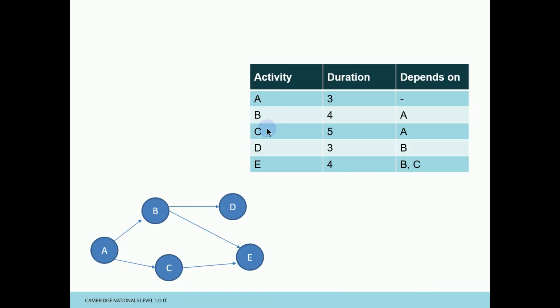So the next thing, this hopefully you recognise as a PERT chart. Okay, so a PERT chart, or Program Evaluation and Review Technique chart, provides a graph of the timeline for a project. It takes the fixed end date for your project and then calculates backwards. So unlike a Gantt chart where you start at the beginning and you work to the end, a PERT chart works in reverse. We find the end date when the project's got to be delivered by, and we work backwards to see where we need to start.